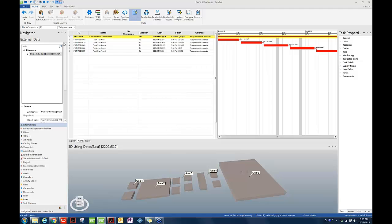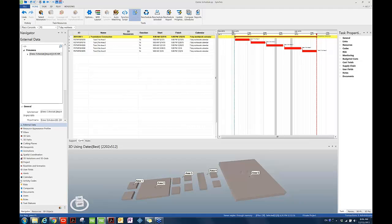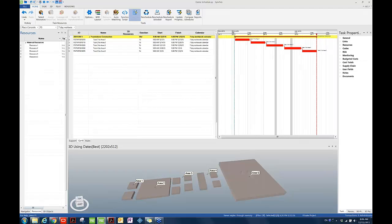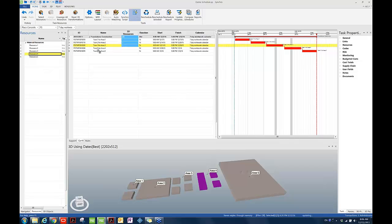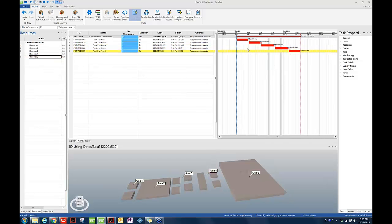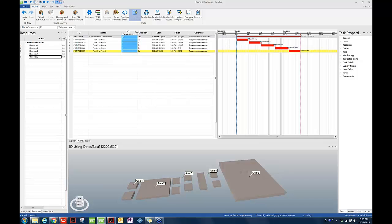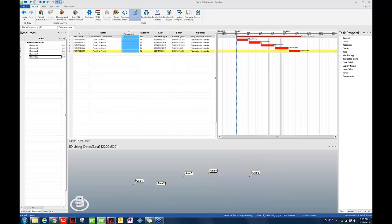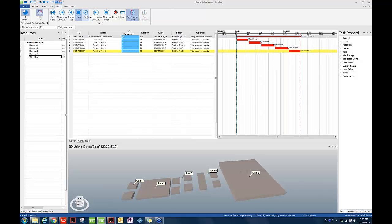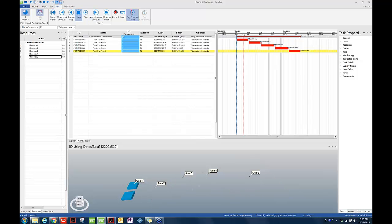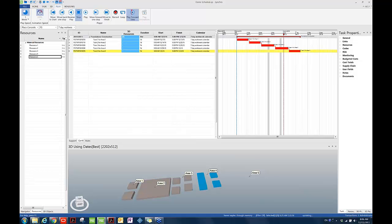Now the Synchro user plans to prepare his 4D model in Synchro by assigning the five created resources to tasks. So what he's going to do is that he will simply drag and drop those resources to the tasks. Okay, so the resource assignments have been done. So if we use the playback feature in Synchro, we will be able to tell from the, based on the current schedule provided by the P6 user, the concrete crew is going to start placing concrete foundations in Area 1, and then move to Area 2, 3, 4, and finish their work in Area 5.